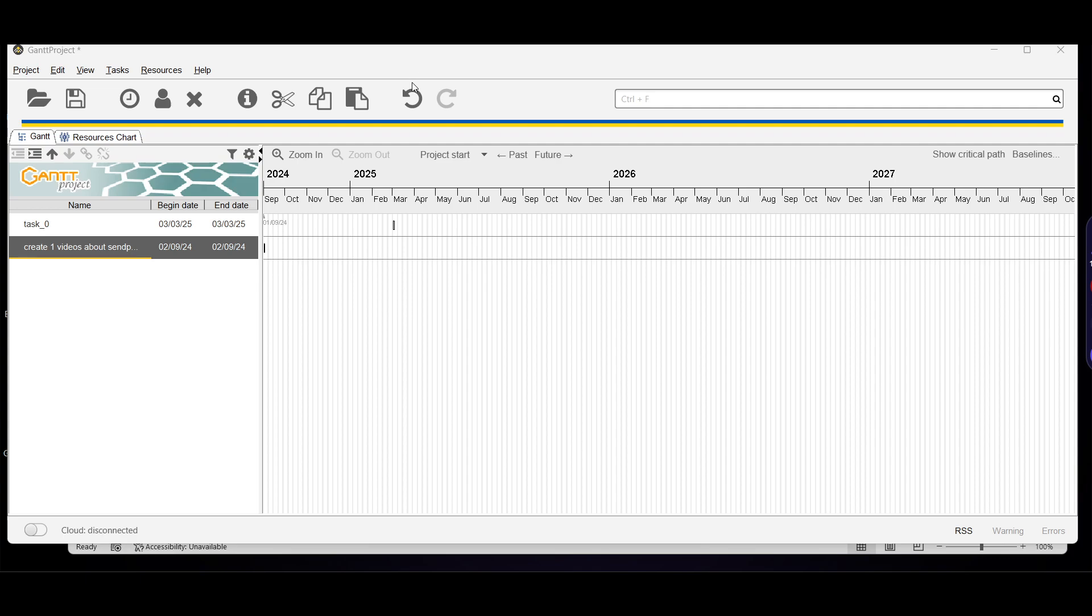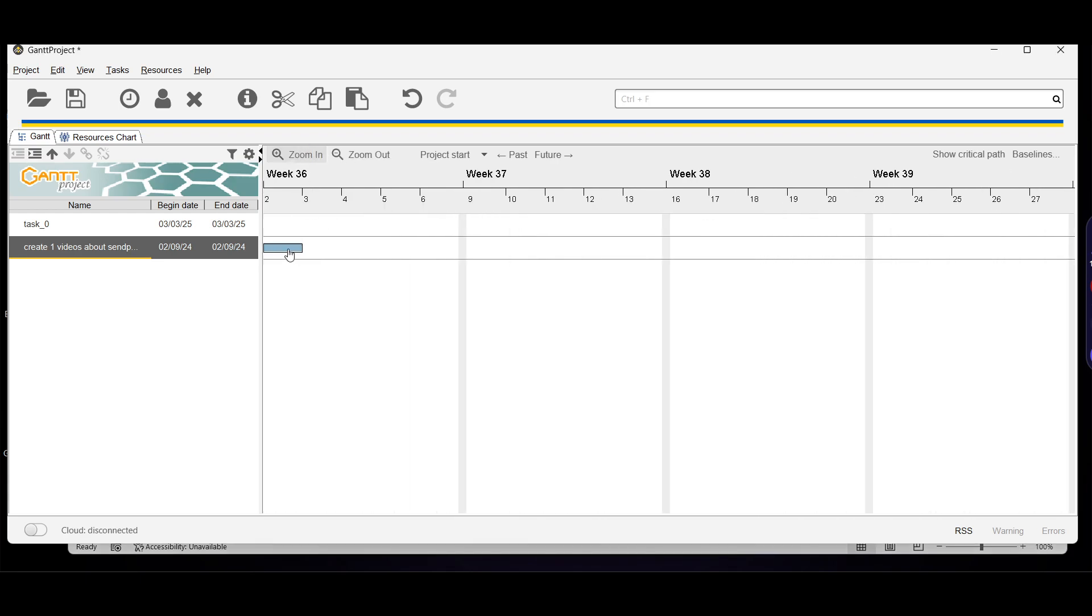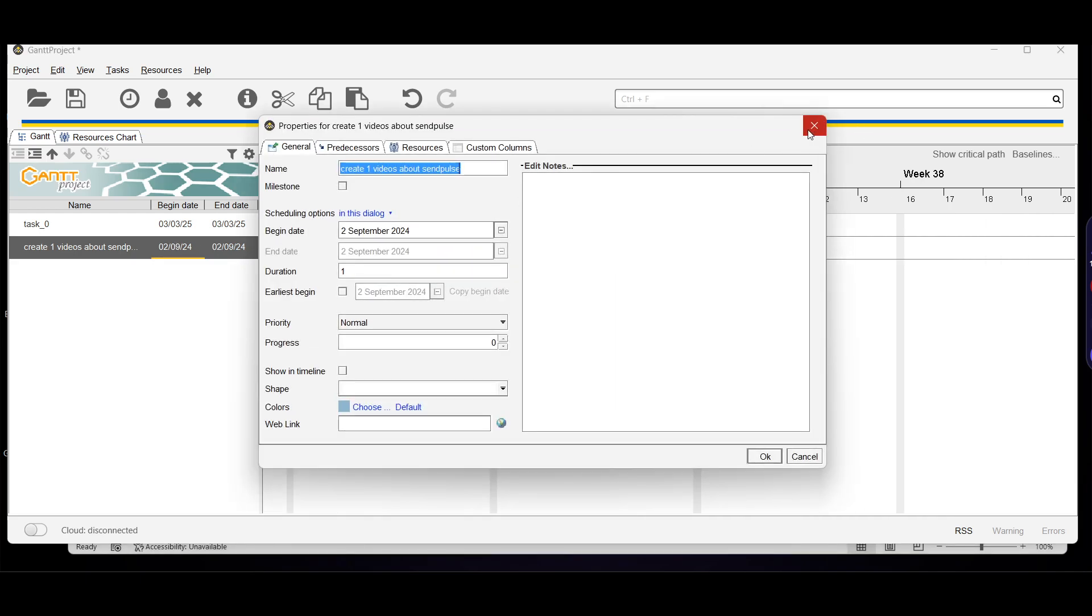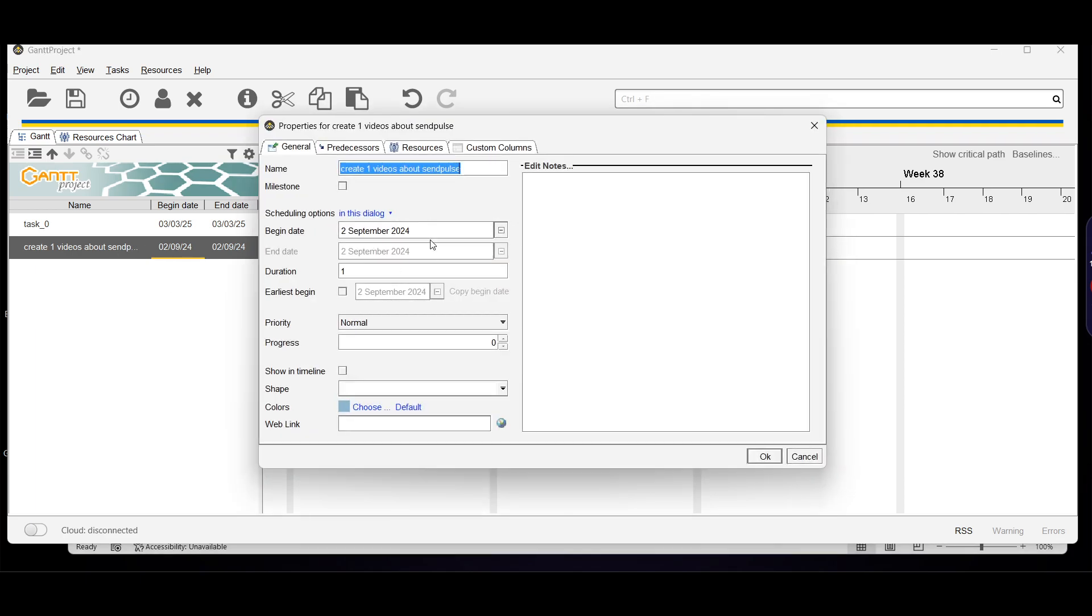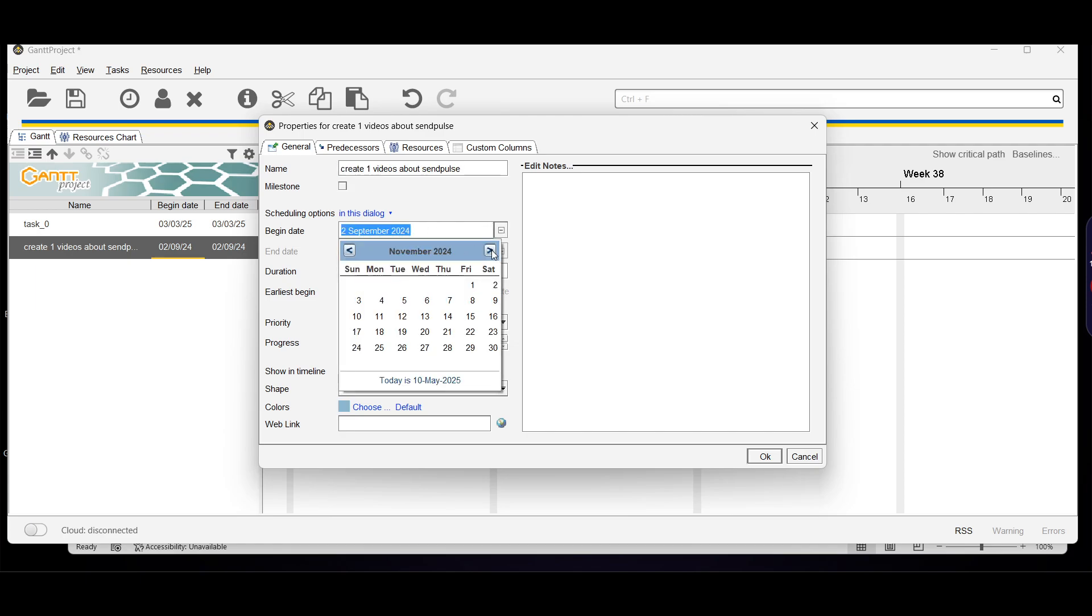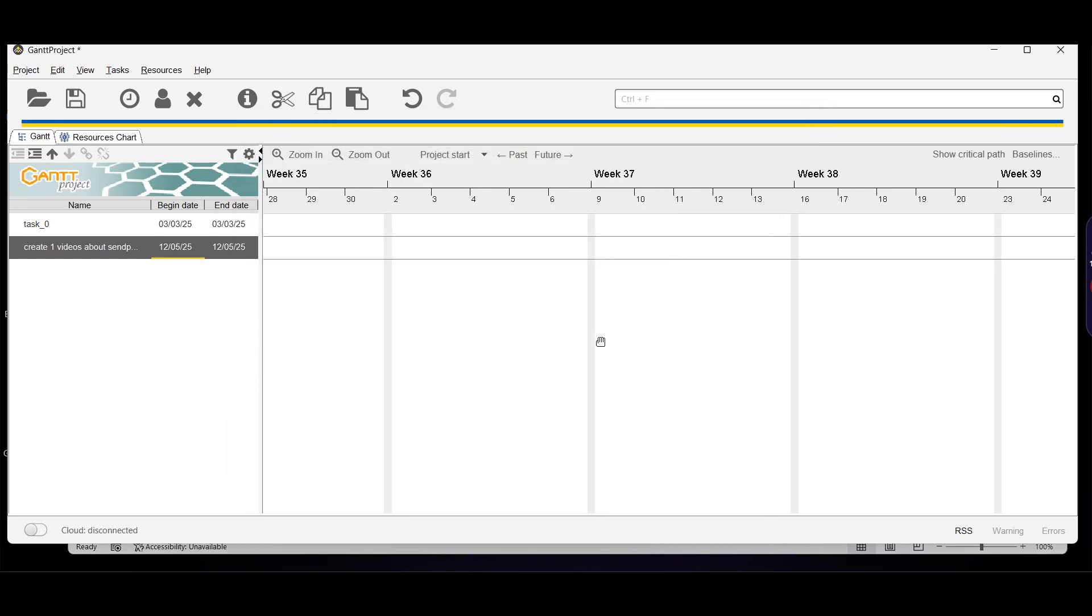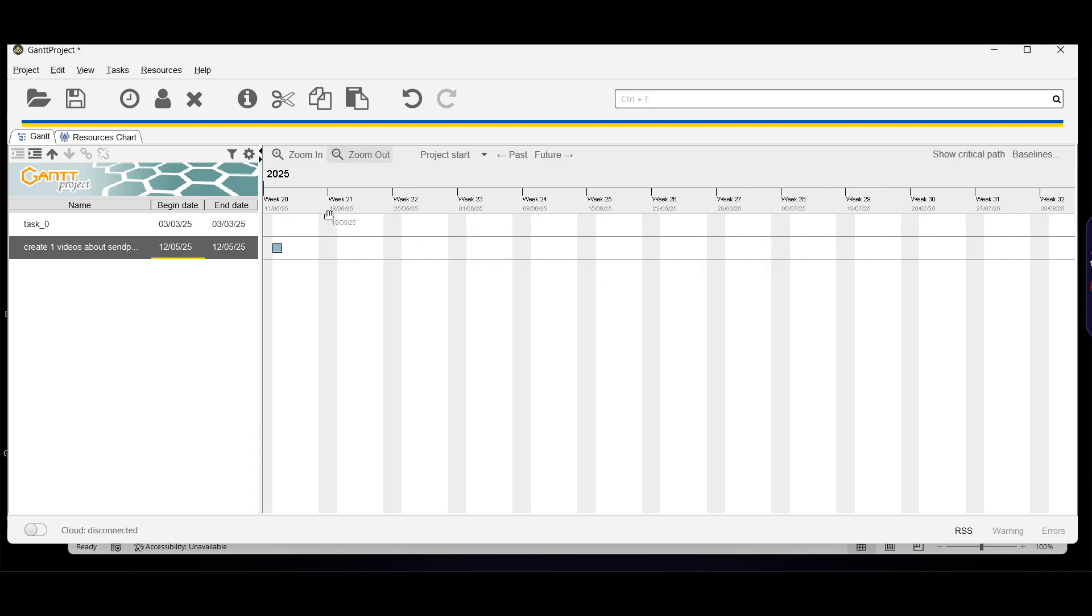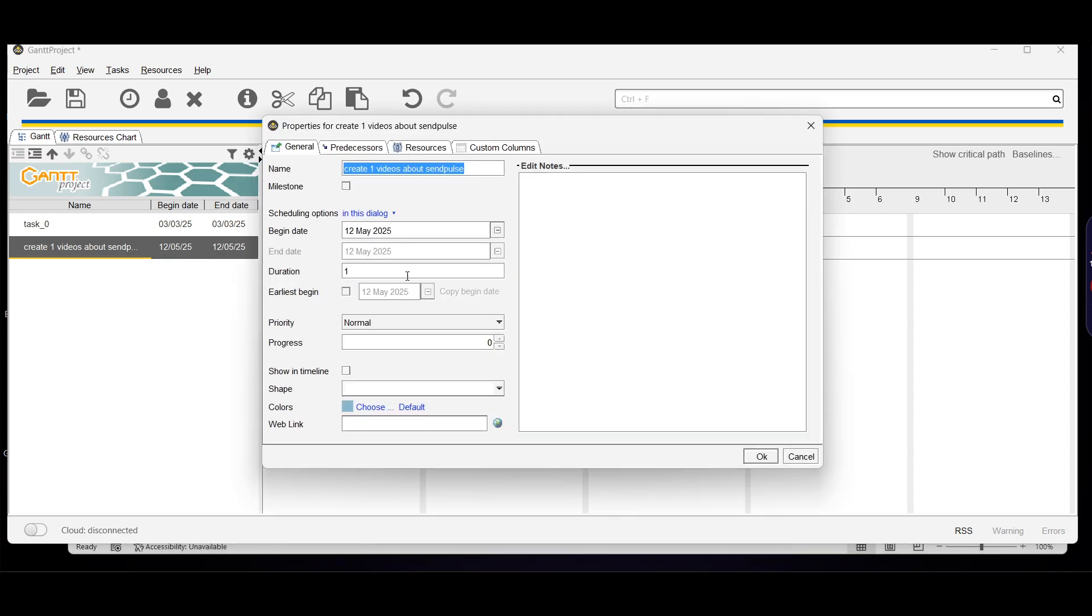You can add tasks by clicking new task and set dependencies by dragging. Zoom in to see the task. You can change the date by clicking on it. Let's say I want to change it from the 27th to today's date, May 10th. Enter the date and click okay, and it will show exactly on May 10th. You can add the end date and add more information by clicking add. You can put a color, add a shape, view predecessors, resources, and custom columns. Click okay and the shape changes completely.